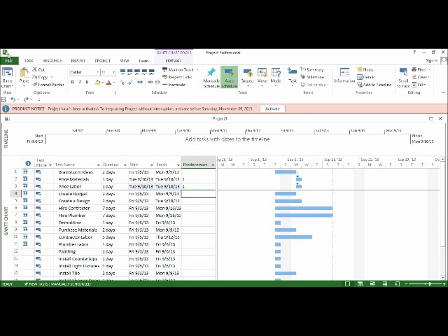You can also show in this column which task will have to precede the row you're on. So I can just put in here task 3 has to precede creating the budget. I type the 3, hit enter, and it also creates that arrow for me as well. So that's just another way that you can show which order the tasks will go in.